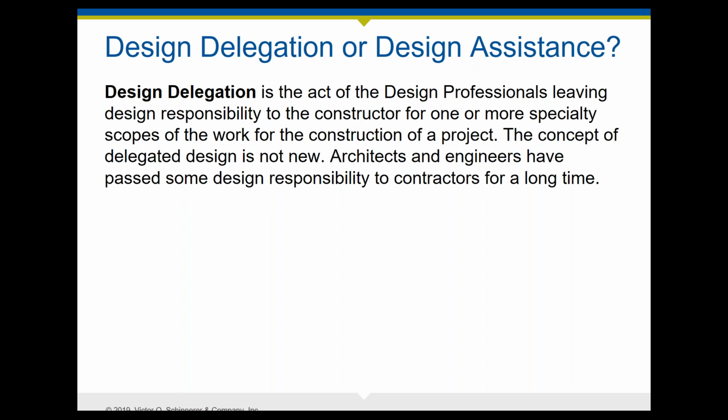And shop drawings have never been part of the actual contract. They're not a contract document. That whole package of agreements and general conditions and all that the contractor has to meet. Contract documents do not include shop drawings because they are communication tools, but there was still some concern on the part of contractors back in the 70s that perhaps they were getting into an area where they weren't insured, and we started offering them insurance coverage.